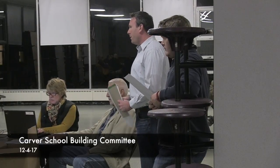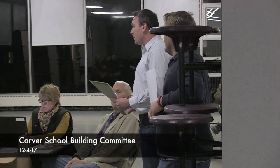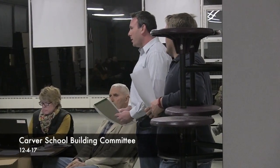And I think that's a good segue into some of the other discussions on the agenda for tonight regarding furniture and technology. And one more point on that, just as a point of reference, how does that compare to other similar projects, to have spent only this little bit of contingency? It's very, very low. So the $287,000, that's not even approved changes. That's everything on our radar to date. That's what it could be. Not necessarily what it is. It could be less than that. Exactly. So in very round numbers, we're talking about half of 1% of the construction budget. A little more than half of 1%. On a typical project, I would say a 3% contingency utilization would be exceptional. Perfect. Thank you.